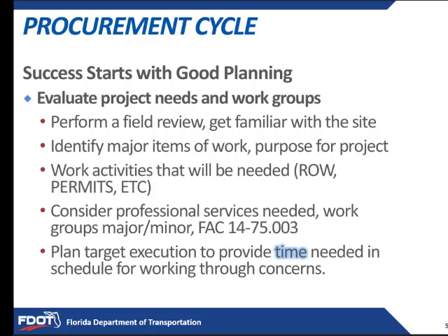Identify the work activities that are needed. Is there right-of-way? Is there permits? Those items are going to be items that affect your schedule, and they're sometimes affecting it by things that you cannot control. So it's good to know those right up front as you start to develop your project.